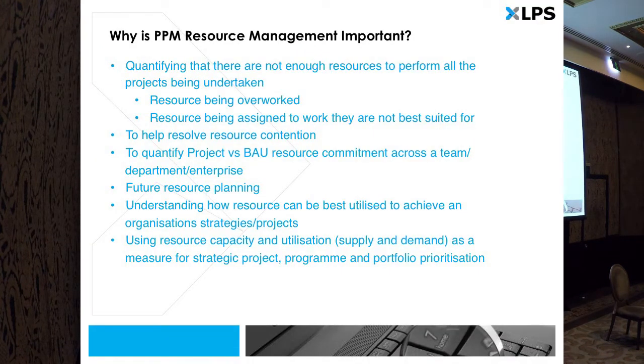Other key areas, it helps us to quantify perhaps and understand the split between project management effort for our resources and BAU effort as well. So looking at what that mix is and understanding where as a business or as an organisation we really need to focus our time and effort and how we can forecast that time.